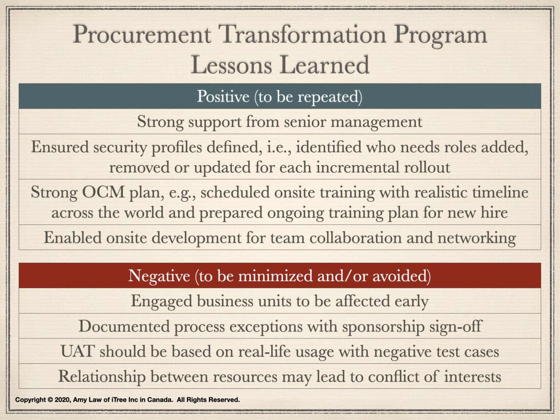A better way to improve the situation is to allow sufficient time on the requirements gathering and process validation through running several requirements workshops across a 4-week cycle with different day times to ensure all business units can participate.